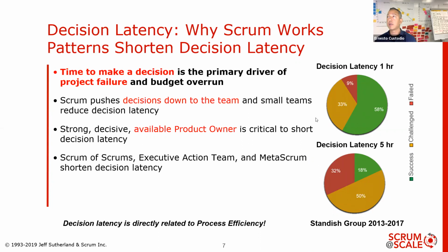Normally what I see is that a product owner could potentially take days to provide an answer in a distributed team, right? If I have to wait for the 12-hour cycle to complete so that I can get a question answered by my product owner, and that person might not have the answer immediately, then we're going to the second day, and we're talking about days, not hours, when we're dealing with distribution. So it's significantly impactful,